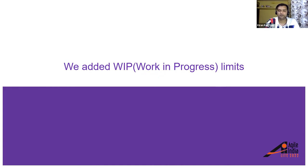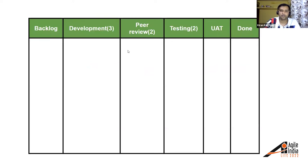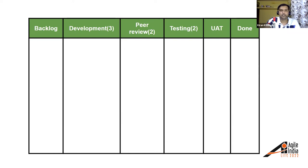We defined a number for each column — above which no new items are allowed. For example, the development column has a limit of three, peer review has a limit of two, and testing has a limit of two. You may ask how we arrived at three, two, and two — it's experimentation. We started with three because we have three developers and experimented from there. If it doesn't work out, we can always change based on new learnings.